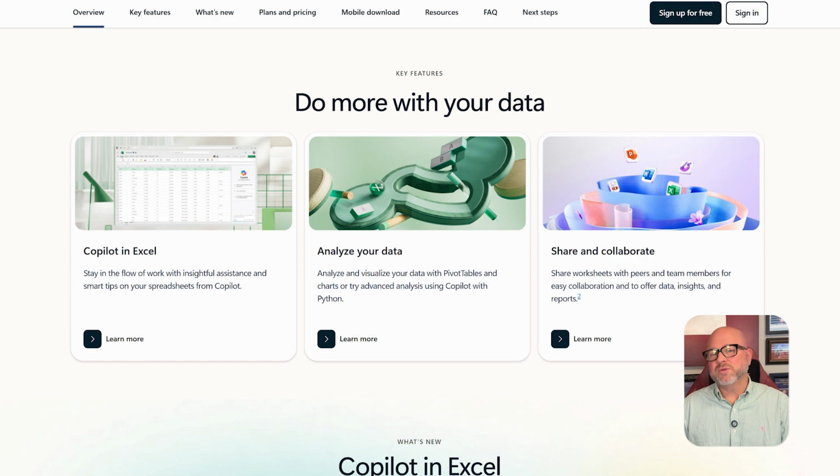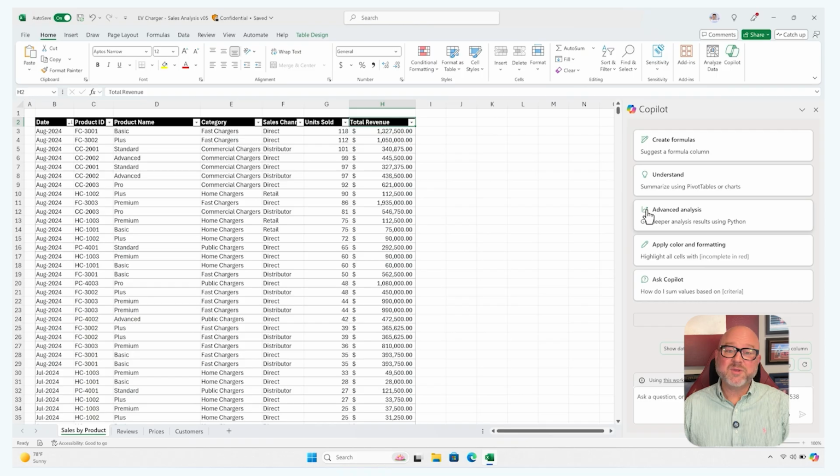Excel, meanwhile, is much more open-ended. You can absolutely manage a project with it. You can create task lists, timelines, budgets, and even Gantt charts using templates or manual formatting. But everything has to be built from scratch. There's no automation for scheduling, there's no built-in dependency tracking, and no project-specific reports unless you build them yourself. That said, its flexibility is what makes it attractive for smaller teams or individual projects that don't need all of the bells and whistles.